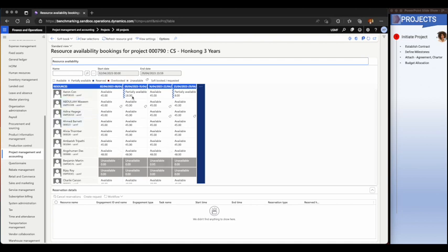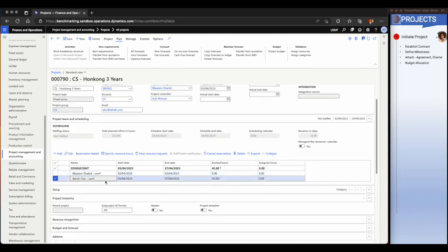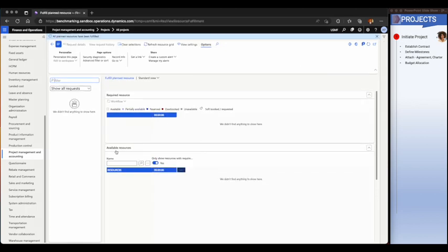So you can say that okay, I want to book Aaron for this week, and you can say soft booking for Aaron. The remaining capacity of Aaron will go to this job. So you can see the different statuses of their booking items. And once you have selected, Aaron and Wasim are now soft booked. So Aaron had 45 hours booked. Wasim did not have any because he's coming from the project manager profile. If you want to view resource requests, you can see that. So what are the resource requests that are coming?